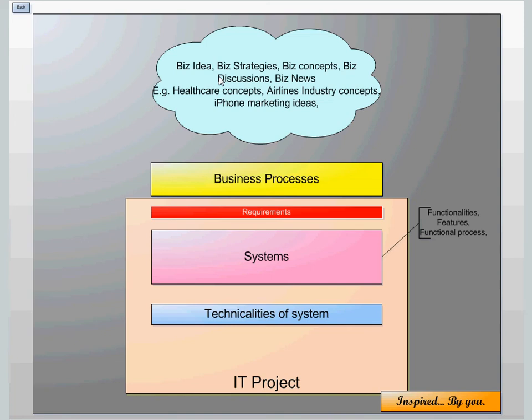If this thing happens, then he will tell the CEO that he's not able to purchase it. If there's a slippage in the timelines, let's say they want to do the cold calling in August 2014, then they need to have the list ready by a certain time, maybe by July 1st, 2014. And then they need to hire people to cold call. Those people who get hired need to be trained on what they should talk and what they should not talk. The hiring process should start, let's say, in February 2014.